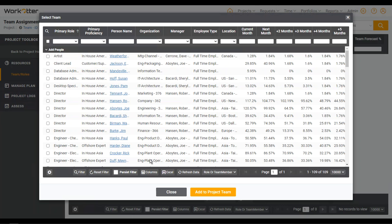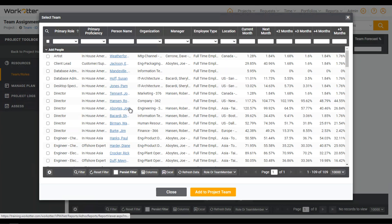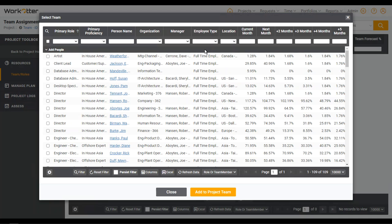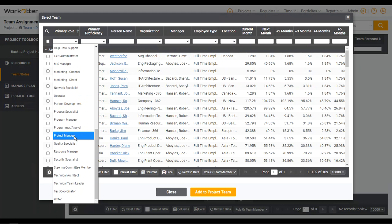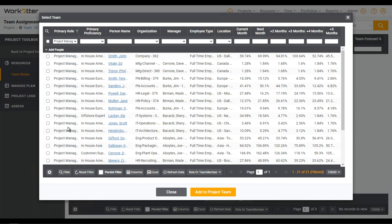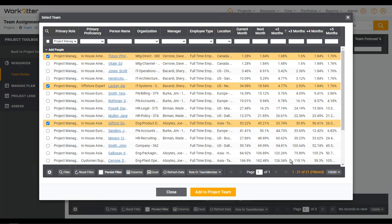If I want to expand the people section, I can see all the people as well, and these links will pull up a dashboard of exactly what each person is working on if you need to understand more about an individual's availability. Don't forget you've got these great filters at the top — perhaps you want to filter across the database on all the project managers, which I've done. You can sort and say this project is going to start in two months, so Phyllis is my most available PM in two months.